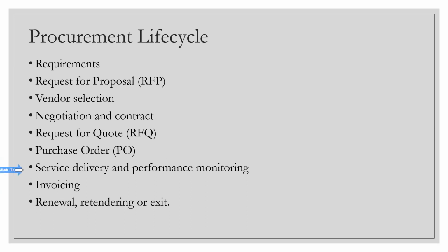Again, to generate the purchase order, you raise the purchase request. But after that, the procurement team or the purchase team takes care of that. They will add you as a watcher. And then they will add the proper teams or the proper focals in the approval chain, depending on the dollar value of that purchase order. The higher the value, the higher the cap limit is. It will go to, let's say, L5 plus or L6 plus or L7 plus and like that. And finally the purchase order will be generated when all the approvals are received, right?